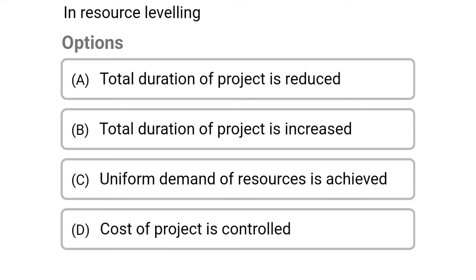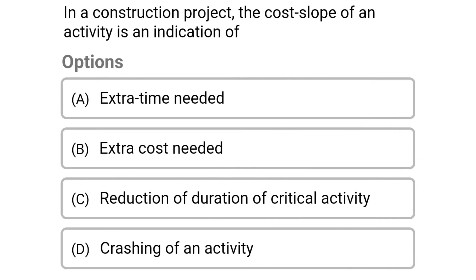Next question: in resource leveling — option A: the total duration of the project is reduced, option B: the total duration of the project is increased, option C: uniform demand of resources is achieved, option D: cost of project is controlled. The correct answer is option B: total duration of the project is increased.